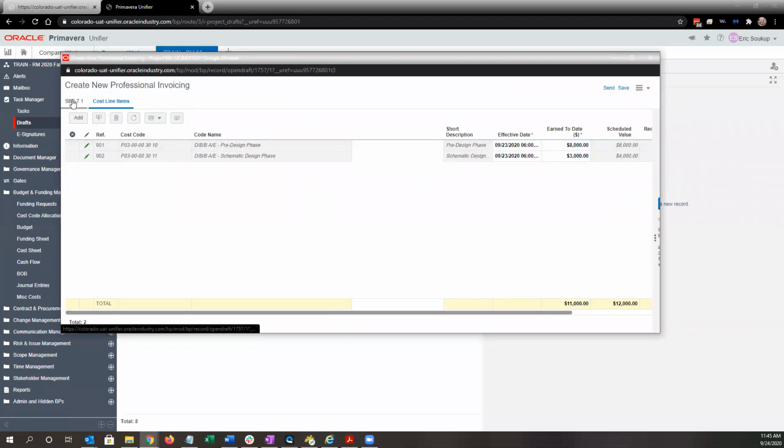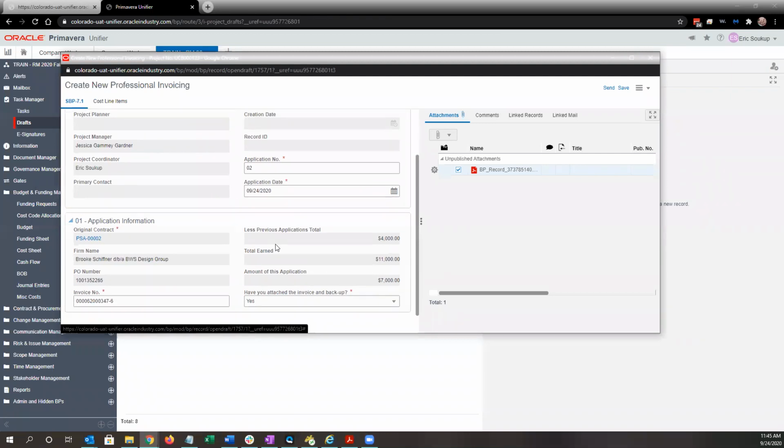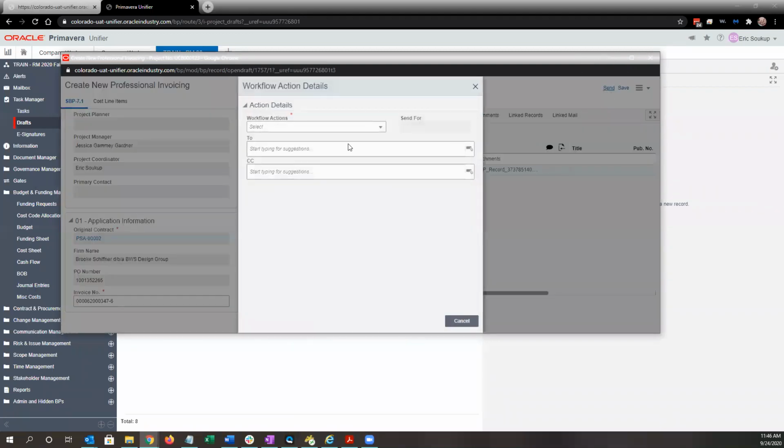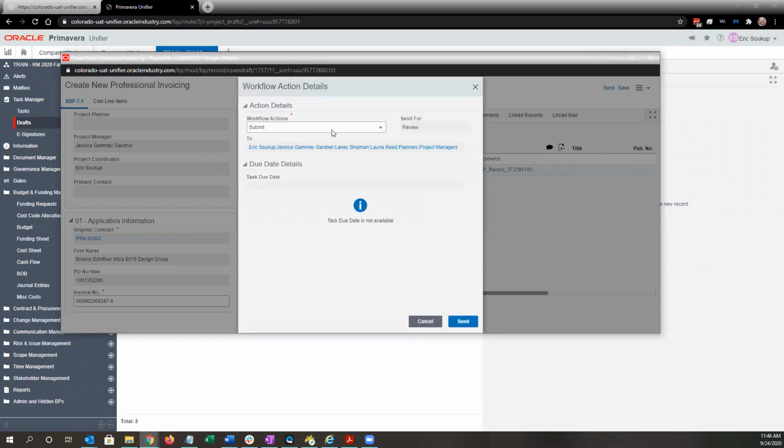If I go back to the 7.1 form, I can see my previous applications total is 4,000. I've entered 11,000. Amount of this application is 7,000. So we'll go ahead and send this on for review to the PM.